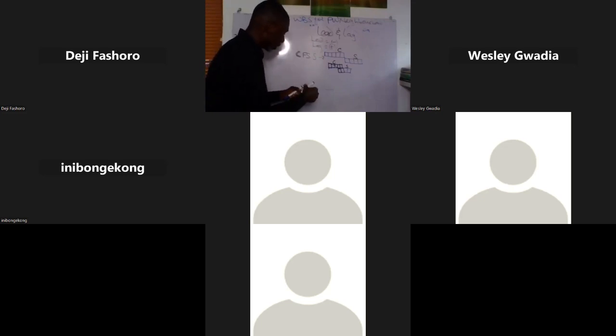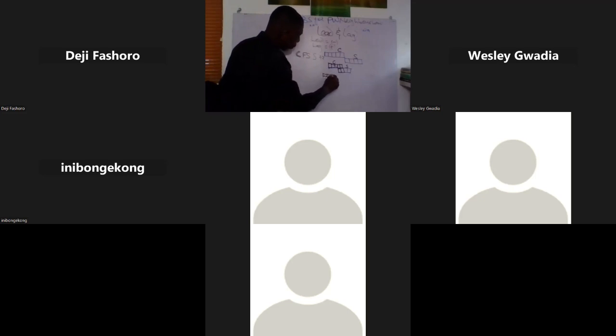Now, what if I make it a plus? It's now a lag, right? I want to be sure you're hearing me. Yes, sir. Yes. It's a lag, right? Beautiful. So how will it look? It will look like this. This is my 1 day, 2 days, 3 days, 4 days, 5 days for column, right? So instead of substructure starting immediately, I am saying delayed by 2 days.